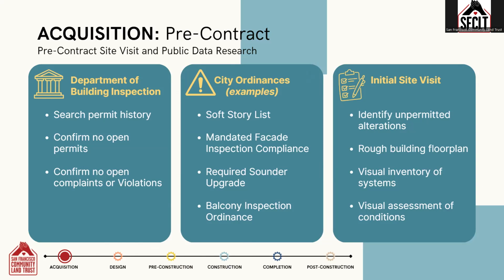After this initial research, the construction manager will provide the project sponsor with a rough scope of work and a basic budget to confirm whether the property needs align with the funds that will actually be available. If there is alignment, then the project sponsor may proceed with placing an offer on a property.